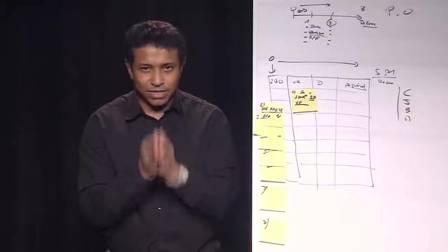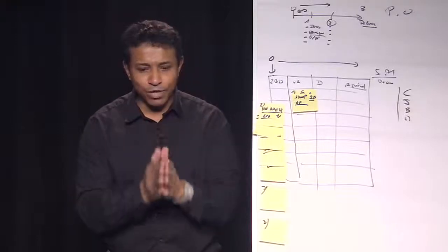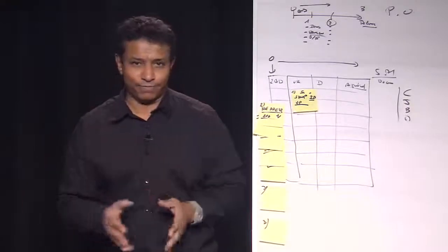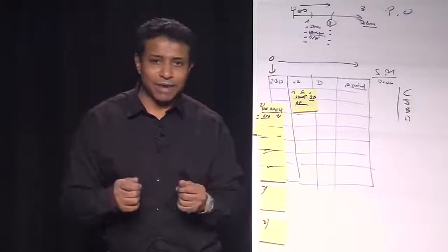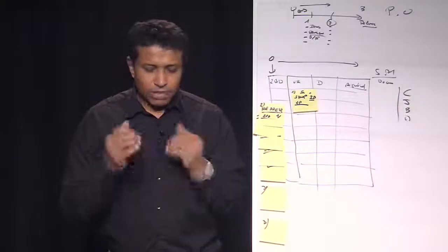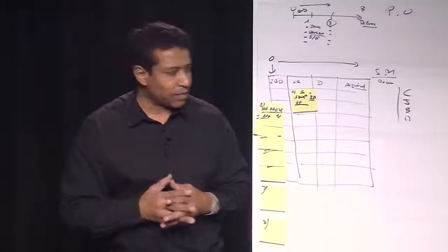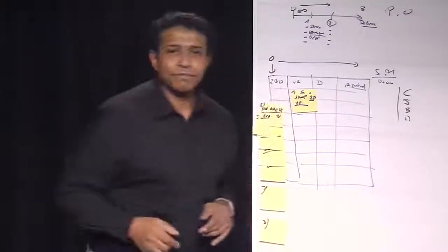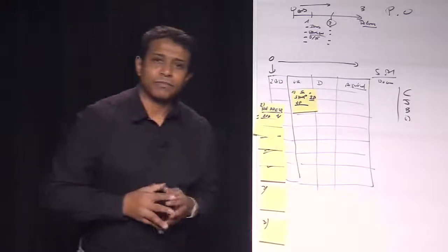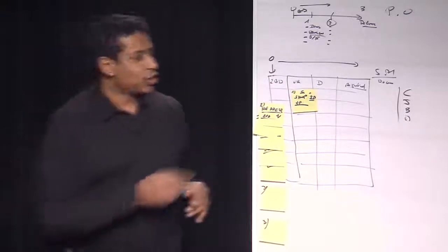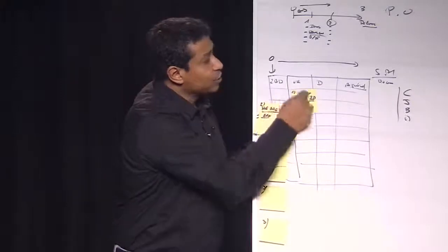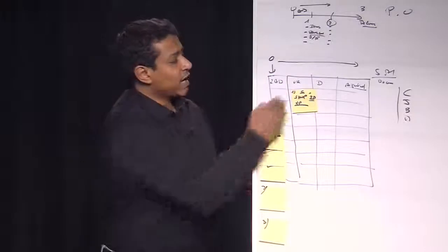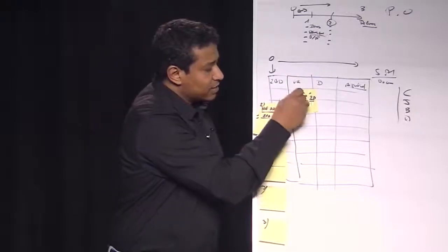This is what the afternoon is all about, and it's really important that any meeting has a target, a goal. So as a team now, let's go back. I'm going to the stand-up meeting. Charles, take this, 2 days. So what does it mean? It means that Charles is forced to do this during 2 days, and that he cannot do anything other than this task for 2 days.